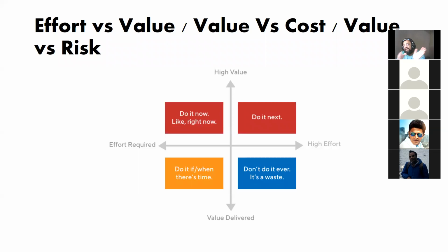Next one is high value, high effort. We need to do it. Let's do it. Then the third one is less effort and kind of okay, not too much. The one which we will never do is the high effort and low value. Okay. So this is the Eisenhower matrix.